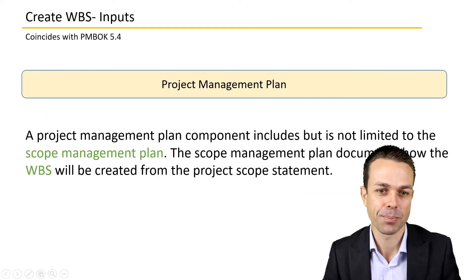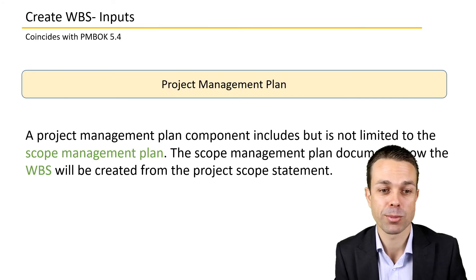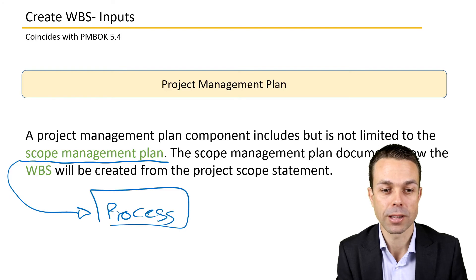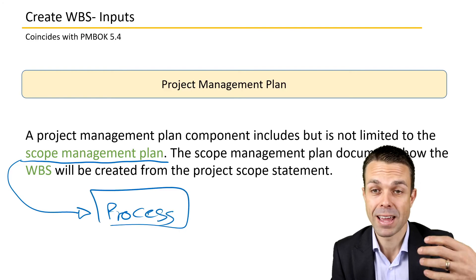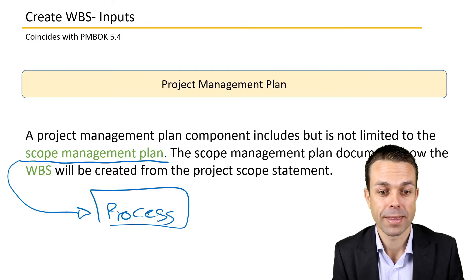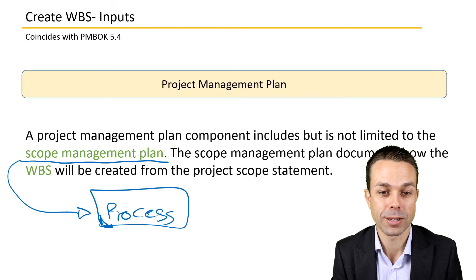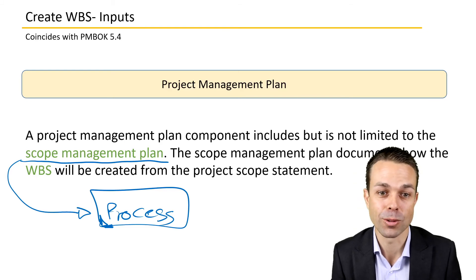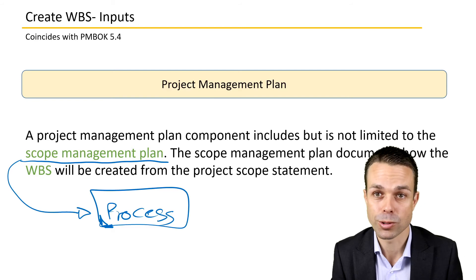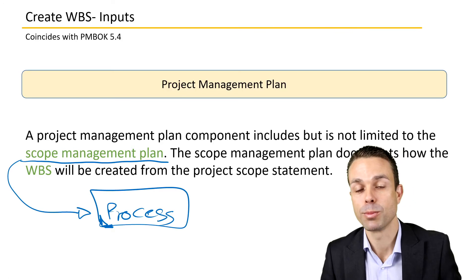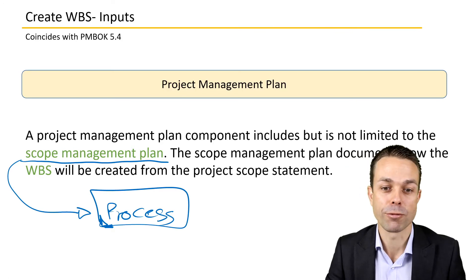Looking at inputs in more detail: the component of the project management plan that we need is the scope management plan — the actual process describing how we collect and collate requirements and break them down into activities. That should have been done during Plan Scope Management and describes who we're going to engage, what stakeholders are involved, what processes and tools we'll need. The scope management plan documents how the WBS will be created from the project scope statement.